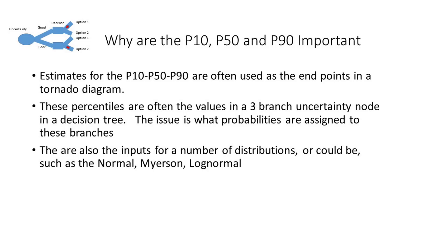One method is the equal area method, which assigns 25, 50, 25. And the other is the Swanson method that assigns 30, 40, and 30.